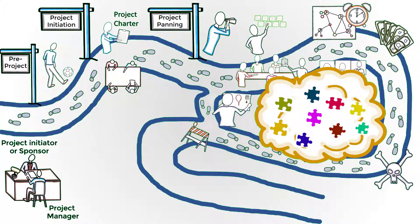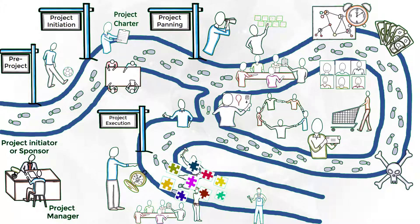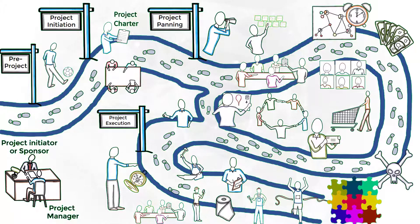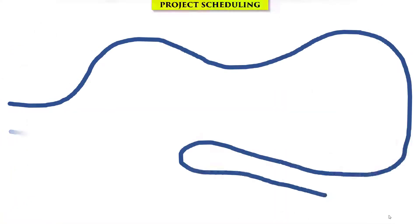For each task, durations, resources, cost, sequence, and risks are defined. Once the project planning is approved, the project execution starts. The project team works on each task according to the schedule. In the end, the project product is delivered — and hopefully according to the client's initial idea.